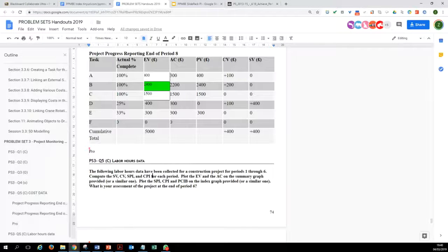In question 5, we are reporting using systems where a lot of construction companies do not report the cost data. Rather than reporting cost, they report labor hours data, which is obtained from the timesheets, and then the accounting department and their enterprise portals integrate the salary with the hourly sheet.